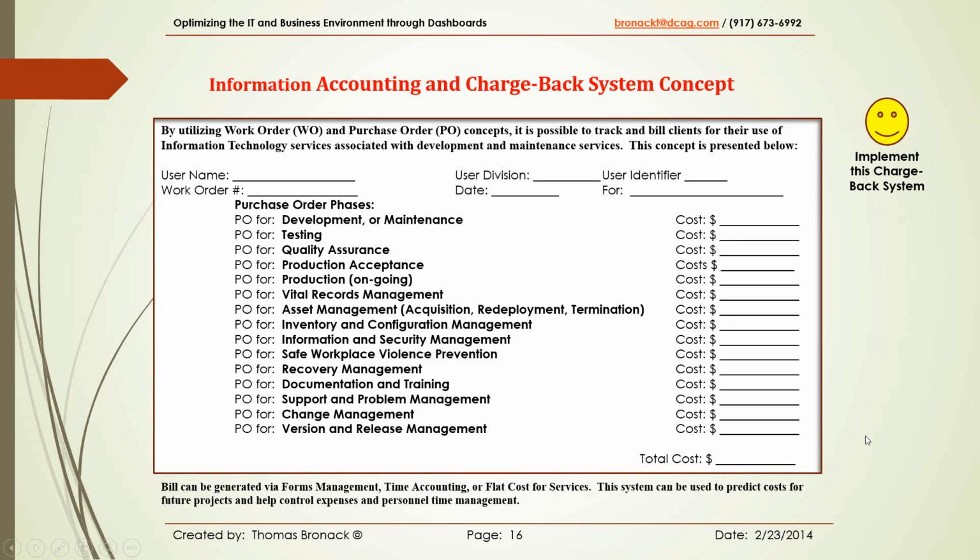That can be used for a chargeback system, but it can really be used to help people who are planning a project, because most projects in the company are similar in nature. So you can go back to this system here and see what areas were responsible for achieving this goal and what was their average cost. So you can put that into your budget and plan for it better.